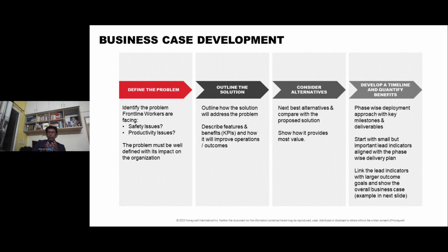But when we talk about this quarter, what we are going to do, next quarter, what we are going to do, that may not have a high dollar value impact. It is important to identify those lead indicators, which will eventually contribute to the long-term financial goal, be it reducing the production losses or improving the production capacity, optimizing the production, and that, let's say, leads to a $5 million financial benefit by end of 1 year or 2 years of that program. Now, we may not be able to show $5 million just at the end of phase one, which is maybe 1 quarter. But identifying those as lead indicators, that if these lead indicators are improving, this will eventually give you $5 million savings by end of a year, is very important, and it's very tricky. It's not easy to do. So that needs a detailed session to identify those.